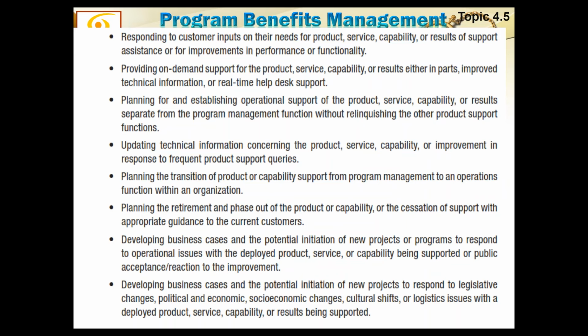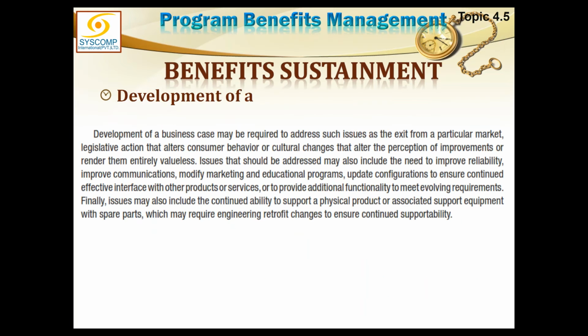Updating technical information concerning the product, service or capability, planning for transition of product or capability, planning for retirement and phase out of the product, developing business cases and the potential initiation of new projects or phases to respond to legislative changes. So all these points have to be considered, only then the benefits could be sustained.